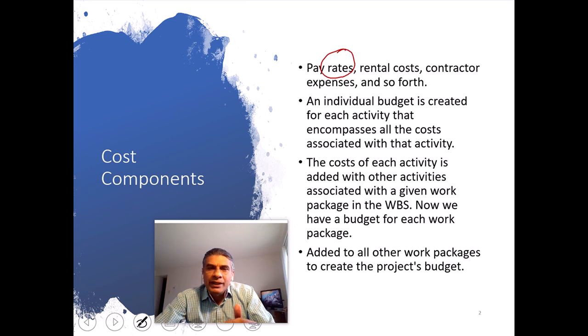Sometimes it may not be a time and material kind of arrangement. It depends upon the contract. We are approaching a vendor or a contractor and they are doing the work and completing it with a fixed amount. So all these characteristics need to be understood thoroughly so that we should be able to define what are the cost line items for each task, and when those can be summed up, we can find out what is the total cost of the project.